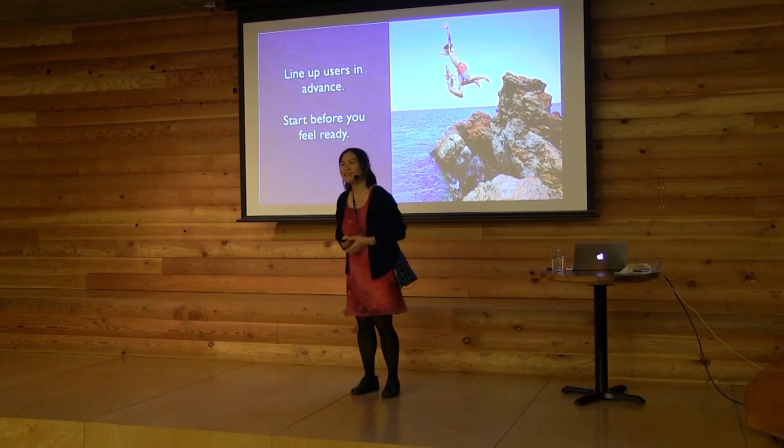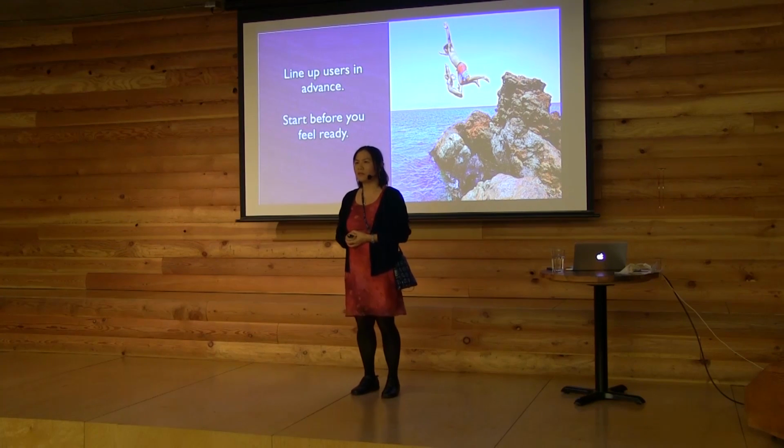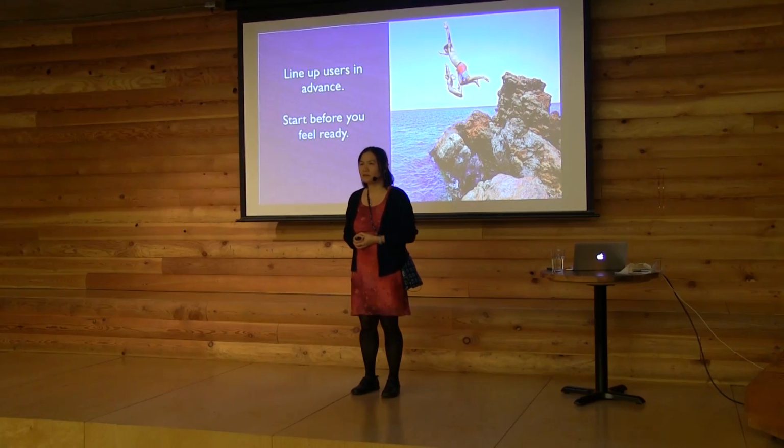To also answer the question if customers actually like to be involved, we do it every 2 weeks, and they're stoked. The first one is a little bit weird since they get something half done, but once they get it, it's amazing, and we actually validate stuff before it gets built. Just do a prototype, and we validate these iterations, the mock-ups. So we don't even start building anything before we have feedback on whether it's the right thing or not.